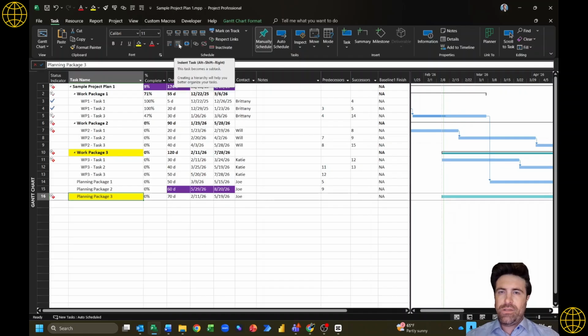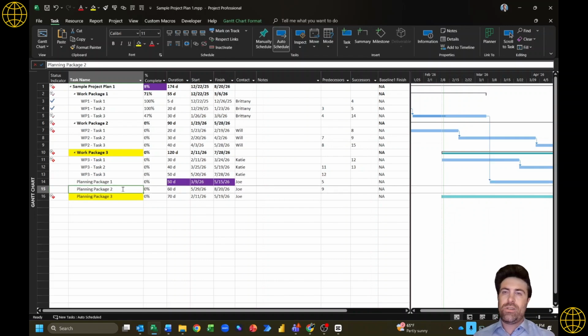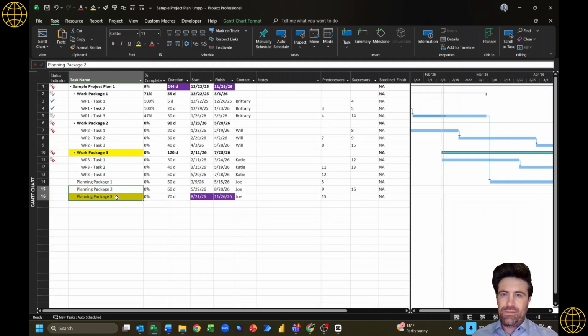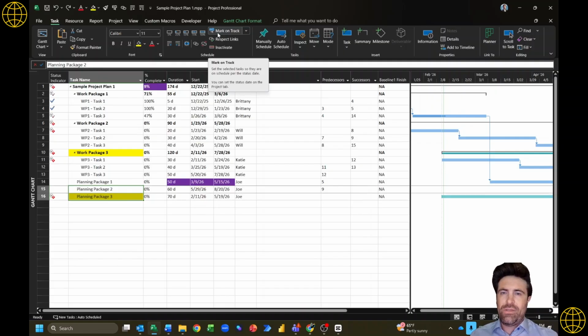If you hover over, you see I don't even need to click the button. I could just highlight it. I can select any task and I can do Alt Shift left, and that moves that task for me. You could also use the hotkey for linking activities, which is going to be Alt 2 or Control F2, sorry, which is great. So I would just utilize that as you're going through things.